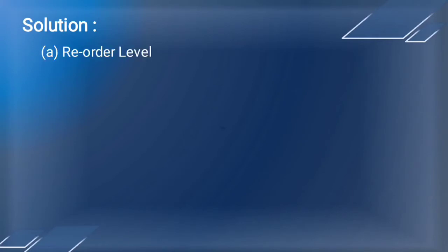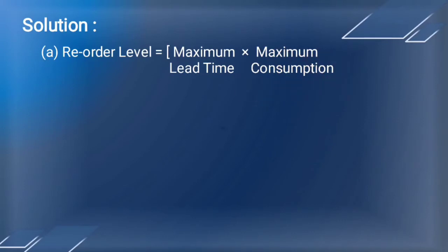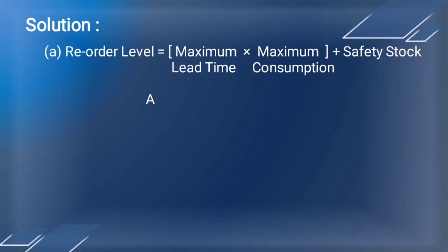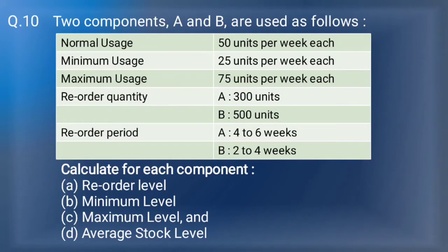A reorder level, which is equal to maximum lead time into maximum consumption plus safety stock. So for A, maximum lead time is given as 6 weeks.